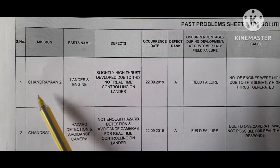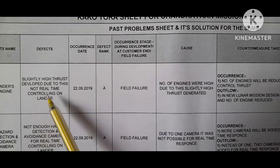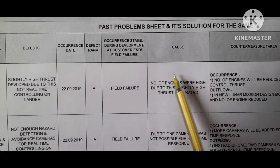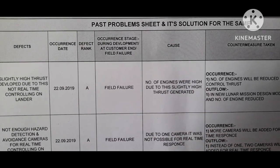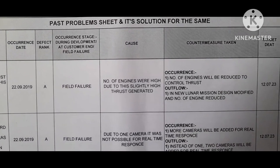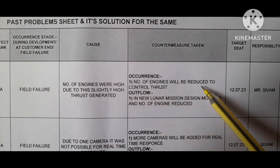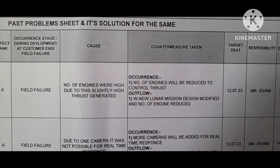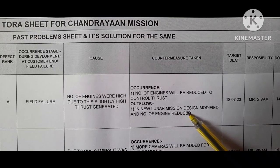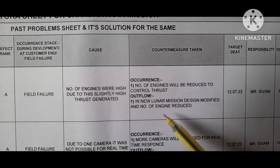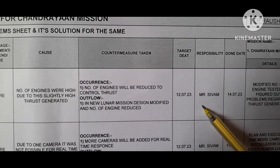Occurrence stage: it happened during field failure because it occurred in Chandrayaan's orbit. What is the cause of the high thrust? The cause is that the number of engines was high, which generated slightly high thrust, and controlling speed was out of range. Counter measure taken: the number of engines will be reduced to control thrust in the upcoming mission — Chandrayaan 3.